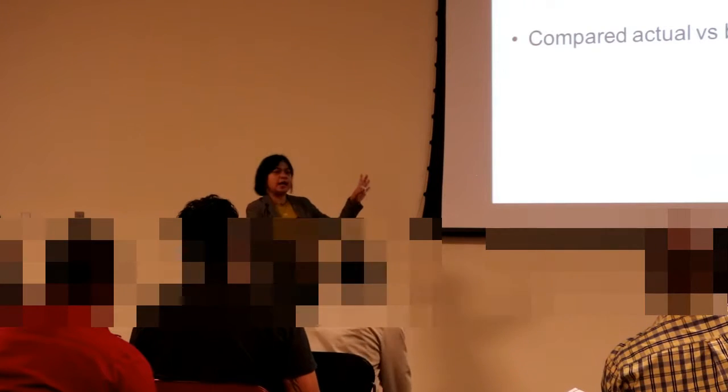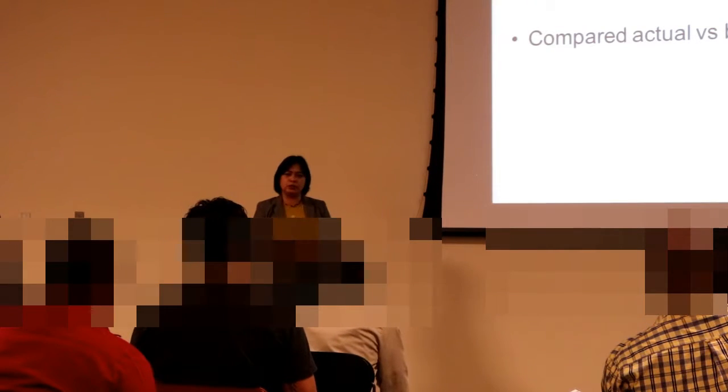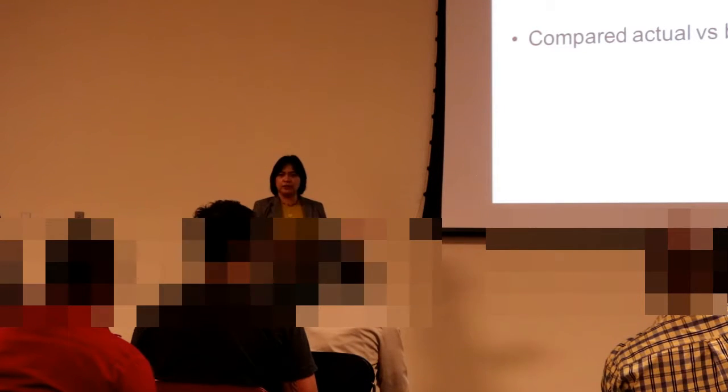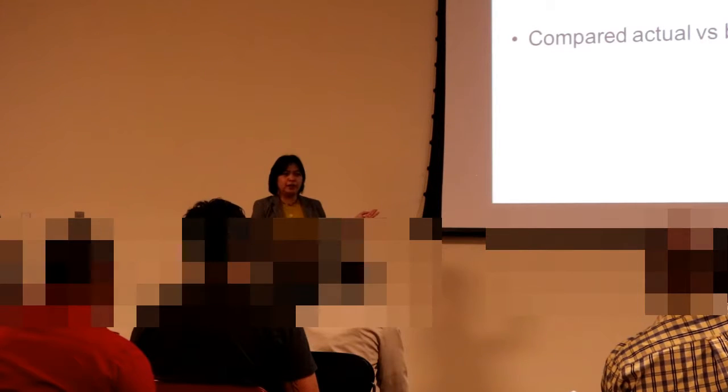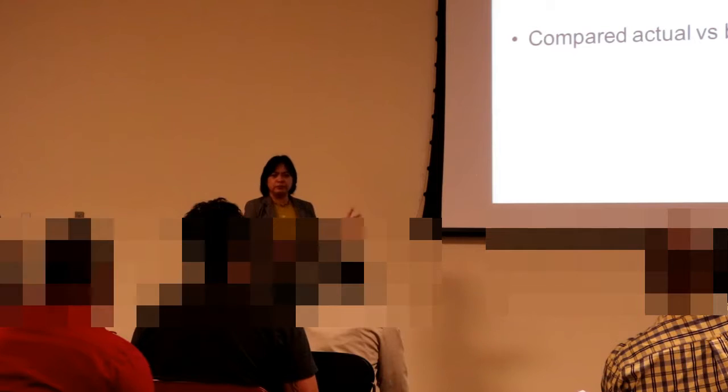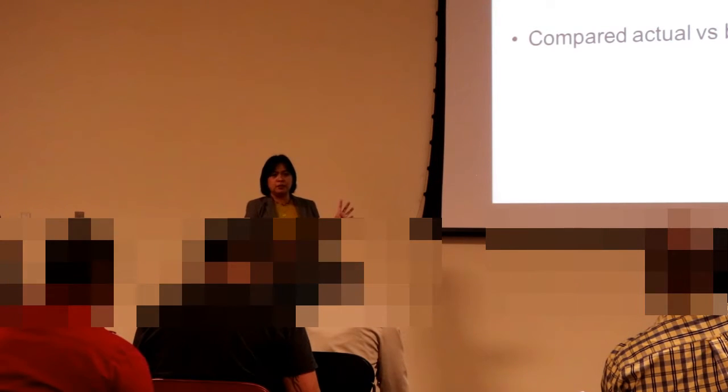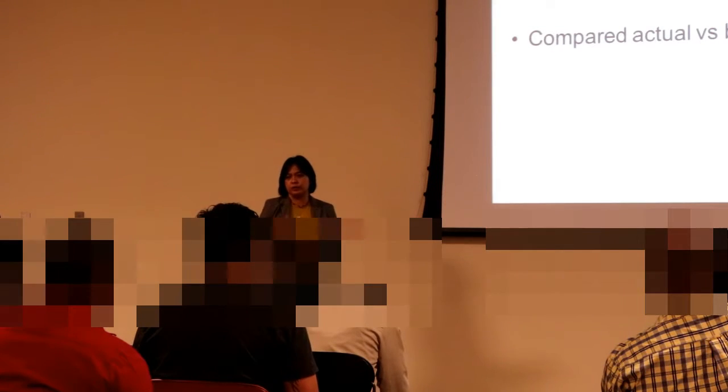And then the other thing too is actual versus budget. That's just purely a performance management system. So you have your budget. If you have a budget of 100,000, and then your actual is already 110,000, and you're at 90% completion, you're not even at 100% completion, but you're over the budget, and that's a big trigger. That's a big red flag. So that's how important the cost accumulation record and having this data comparing your actual versus budget is to manage your business.